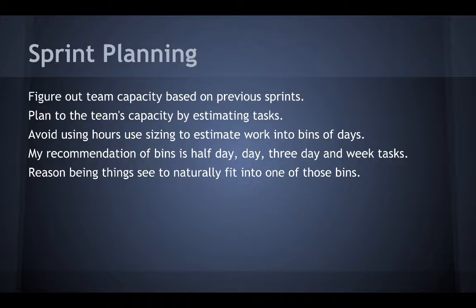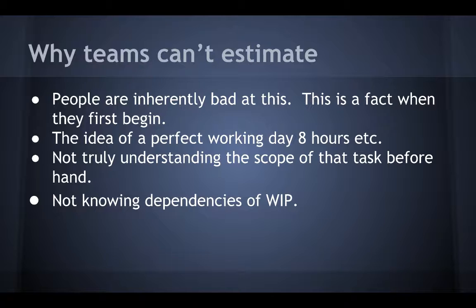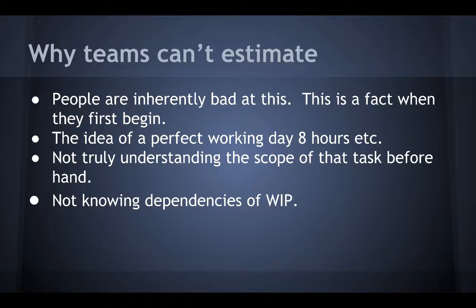In sprint planning, we get the product and feature teams together to go over the backlog of features, select features to be developed in this sprint, and try to give real estimates. The first step is to take the user stories or product features based on a requirements doc and break them down into a series of tasks. One of the most important rules is breaking these down into small enough tasks. Typically, any task has three components: research, development, and testing automation. One issue I've seen time and again is not breaking down tasks into small enough compartments or sub-tasks. Breaking the task into manageable sizes should be done well ahead of time by the engineering manager and product owner. The alternative is spending four to eight hours in a meeting every two to four weeks.